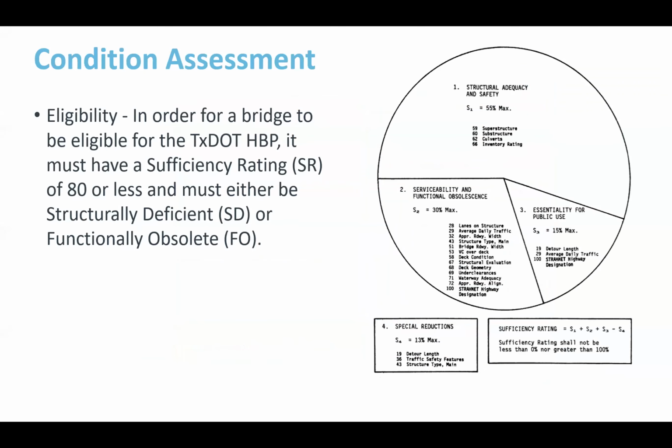All right, so that all leads up to the condition assessment process. So that was the inspection. We inspected. We looked for all these types of defects and deterioration, and we documented them. And we can even do it on a more detailed level for each one of these values of 1 to 4. Feed all that information now into a decision-making process in order to decide which bridges you want to rehabilitate first. So that's where we get to condition assessment.